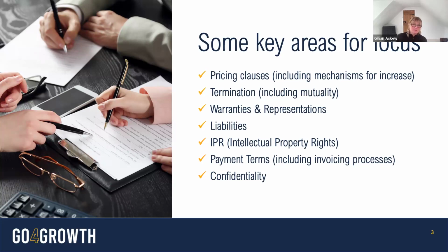Things like energy bills are usually different, but almost always for goods and services and works, a PO will be required for accurate invoicing. And it is the responsibility of the supplier to make sure that all of the information that's required is in that invoice and that you're sending it in the right way, in the right format, with the right information to the right place. And that will definitely give you the best chance at getting on-time payment, regardless of what the payment terms are.